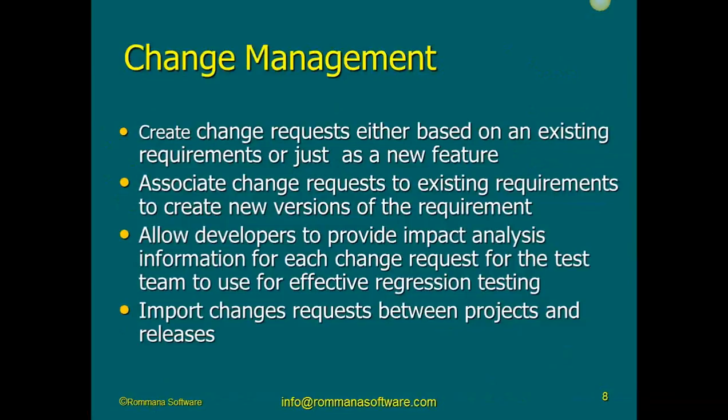And change request in Rommana ALM forces developers to perform impact analysis on the changes and to provide the details of the impact analysis so that the test team can consider this when they do regression testing. Okay, that's very critical. Any tool that does not force developers to provide impact analysis information is simply allowing developers to do all kinds of sloppy work, and they affect other features, and the other features would not be working anymore the way they worked before.